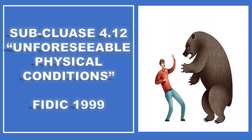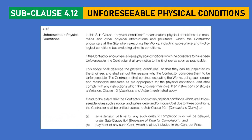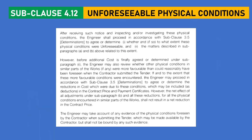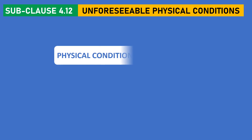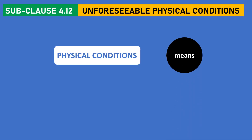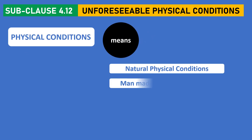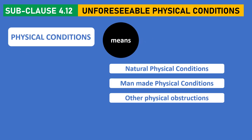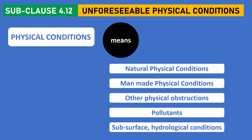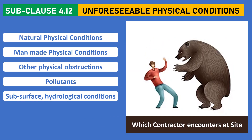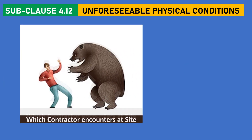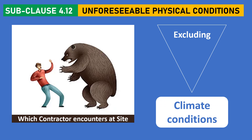Subclause 4.12 - Unforeseeable Physical Conditions in FIDIC 1999 Edition. This subclause provides the definition of physical conditions, which means natural physical conditions, man-made physical conditions, other physical obstructions, pollutants, subsurface and hydrological conditions which the contractor may encounter at site, excluding climate conditions.